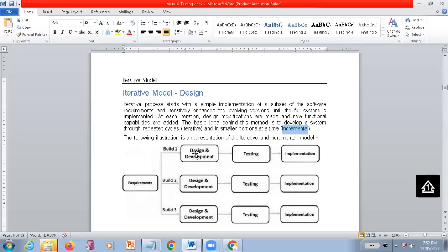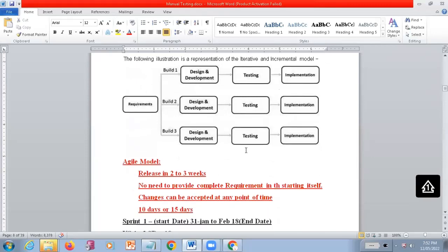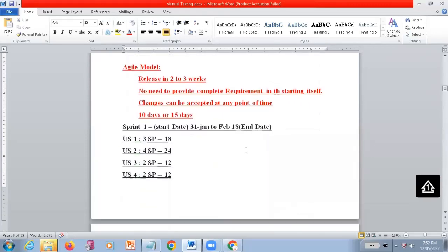Maybe we are having only 5 developers, which means within the given time span we will be able to complete only one phase. The other 2 phases will again be pending. But it should not happen. We should get the resources and we should get the things completed parallelly. So that is one kind of scenario. You're getting this, right?